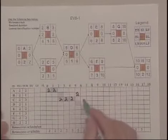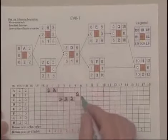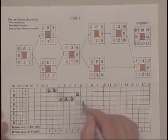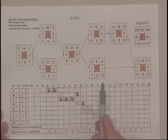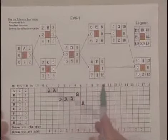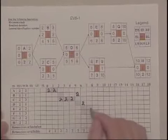And now we're faced with a choice between E and F. The computer runs heuristics and chooses E because it has the least amount of slack, zero. So we go ahead and schedule E.